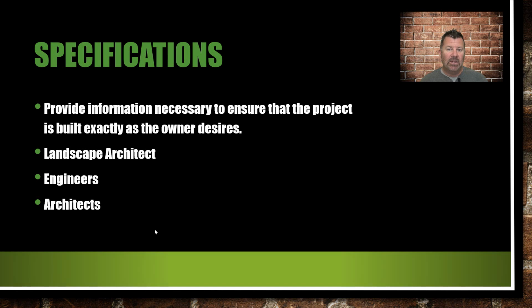This was a one price bid to submit, providing the maintenance for the property for 1 year, and that maintenance included mulching, fertility apps, mowing, and leaf removal. It's not going to be that many leaves. There was some wooded property next door, but on the apartment site itself, there were young trees, not producing enough leaves. But they had to send a crew down there every week for 52 weeks because that's what the specifications called for. They only bid the job based on the plan.